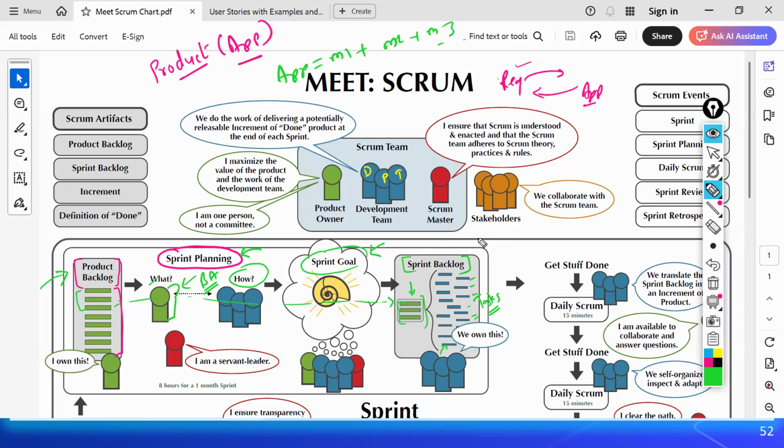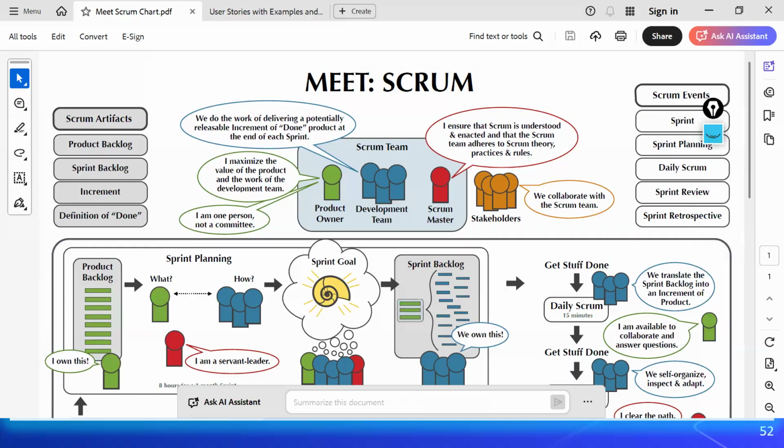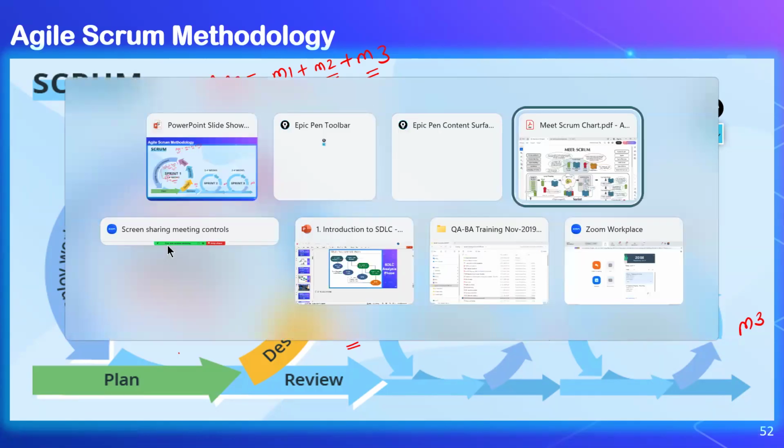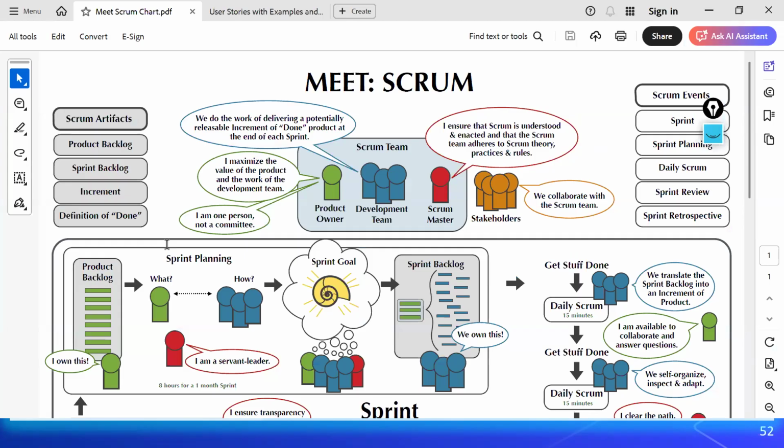So this is going to be the overall planning for that one sprint, because before we start, we need to know what and how much we are going to develop in this sprint, because we have 2 weeks ideally. You can have 3-4 weeks as well, but 2 weeks of that.